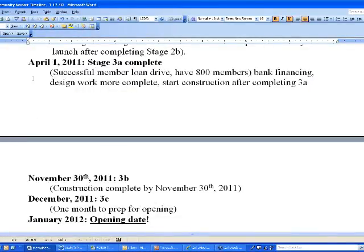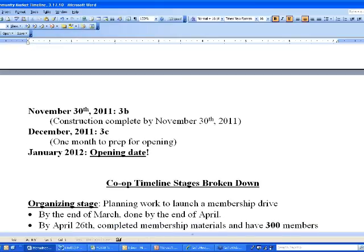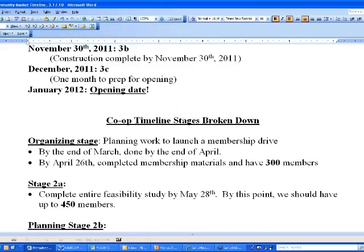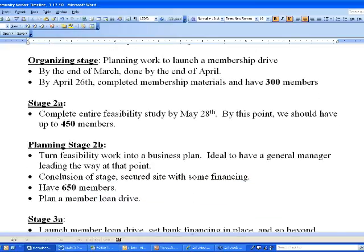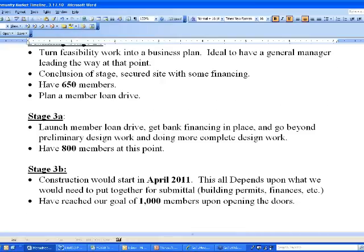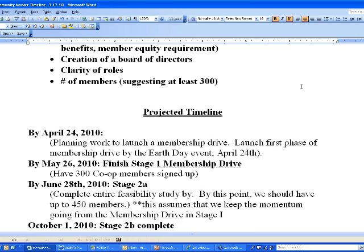Construction starts on April 1st of 2011 — a year from now. Six or seven months of construction, one month to prep for store opening, opening date of January 2012. Will this timeline be the actual timeline? It may be, but more likely it'll be different and the document can be revised. Here's another way of looking at the stages, in a bit more detail but very similar to what we just covered. That's an example from the Monadnock Community Co-op. This document will be available online for people who wish to download it.